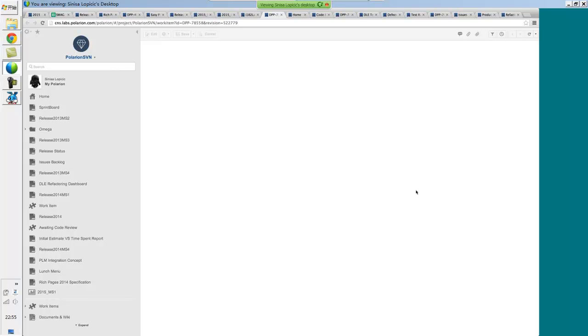Okay, so this is basically one of the completed ones. And again, you can see there are some that are left open. Mainly they're left open on QA. The reason for that is QA is the last process that work goes through. So we are usually left with one or two user stories that don't get a chance to be completely cleaned up and tested. And we do not allow anything that has not been tested to be verified. So each user story has to be tested and verified for our process.